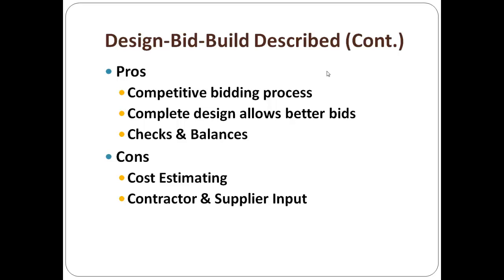And the fact is, from years of history of doing this, we have learned that often buildings are designed by architects without the necessary expertise, either from the architect and his staff or from someone else, an estimator or a builder, and they don't get the cost estimate correct. And when it comes time to bid it out, the bids come back higher, significantly higher, than the project budget for the building. And so they thought it was going to cost $1 million, and it comes back at $1.3 million.